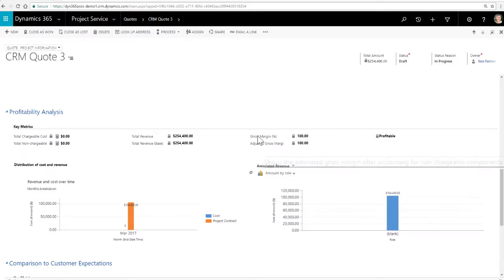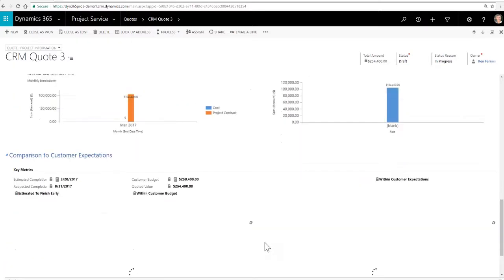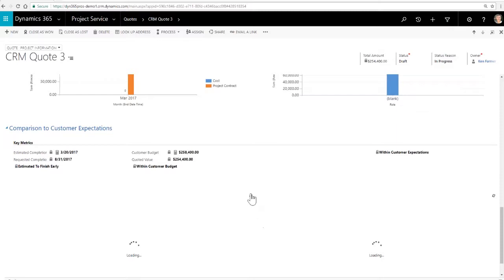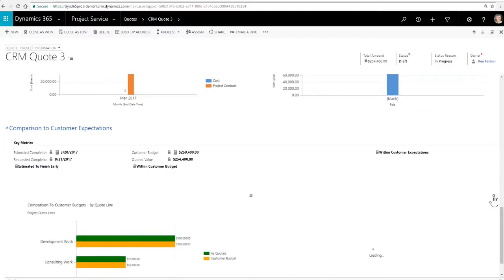You can revise quotes. Once you present it, see the revision ID is 0. That's the base quote that you've created. You present that to the customer. They come back and say, yeah, this is close, but really I want to look at this instead and these 2 widgets instead of those 2 widgets. You can instantly revise the quote, and it basically will create a copy. It'll deactivate the previous quote, the revision 0.